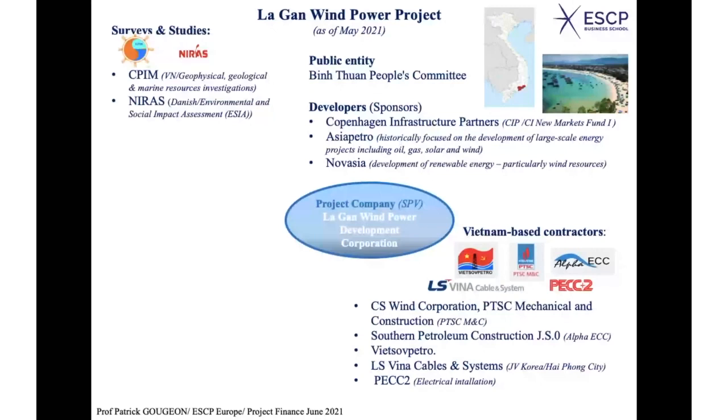What do you have on the other side? If you look at the details, you also have some surveys. You always have, in the early phase of the project at least, some participants which are specialists in providing all types of surveys which are necessary in the early phase of the project development. CPIM, for instance, is a specialist in geophysical, geological, and marine resource investigation. You need to investigate to see under which type of subsea conditions you will develop the project for this offshore wind farm.